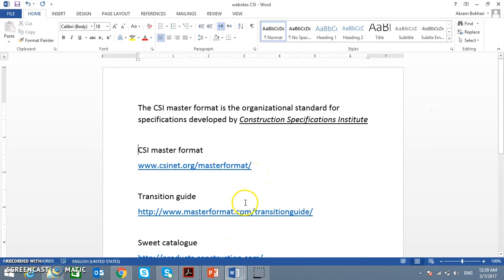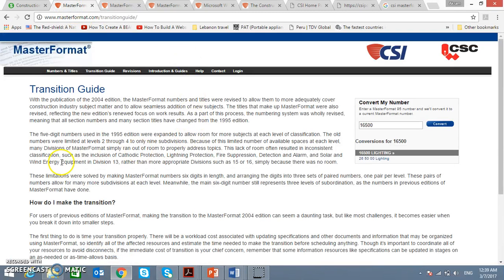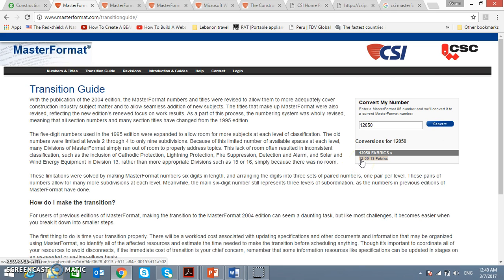CSI has a transition guide — the website is www.masterformat.com/transitionguide. The purpose of the transition guide is to help if you have an old specification according to MF95 and want to find the alternative section number in MF04. For example, if I plug in 16500 and press convert, I see the alternative is 26500. Another example: entering 12050 converts to 120513. This transition guide is just a reference tool for you.